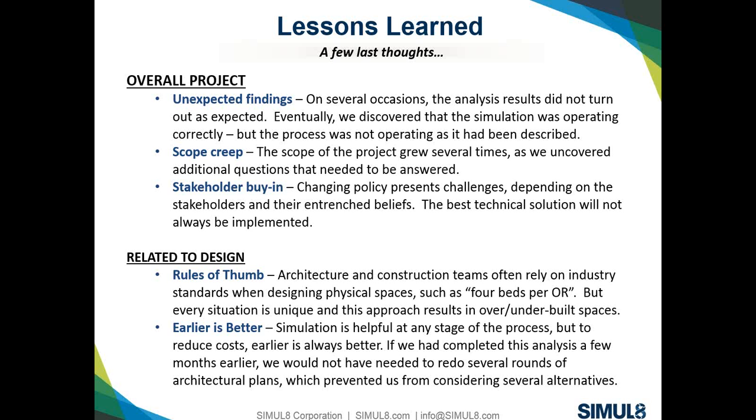The reason we couldn't look at physical space changes is that while simulation is helpful at any stage of the process, at that point, changing the architectural plans and the electrical plans and the approval plans, we would have had to go through all of these extra hoops and a lot of rework to change any simple things. If we wanted to say we want the door on the left instead of right, that would have been a huge fiasco.